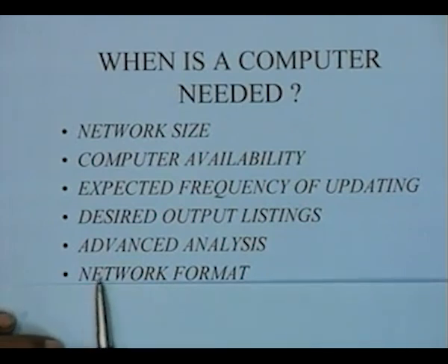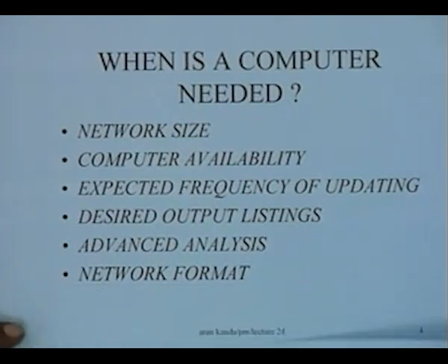By the network format we really mean is the network going to be in the AOA mode or in the AON mode or in the precedence diagramming mode, because different computer packages give you various options in terms of dealing with different kinds of network formats. So you have these kinds of features. So these are some factors which really determine whether a computer is really needed or not.